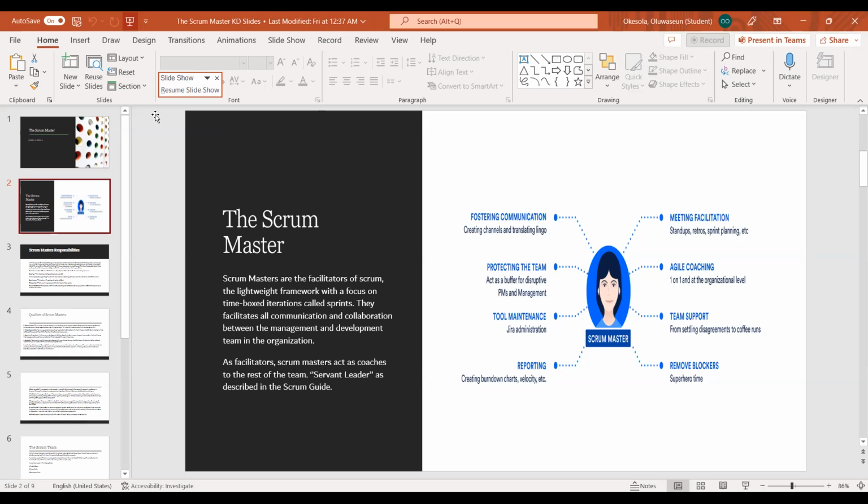Then the Scrum Master also facilitates the retrospective, and this is done after a sprint review where we want to talk about how the sprint went, what went well, what didn't go well, and what can we improve on? What are we taking from the last sprint? What lessons did we learn that we are taking into the next sprint? And what basically can we work on to ensure that it doesn't repeat itself? So a whole lot of facilitation goes into this because the Scrum Master wants to ensure that as they progress into a new sprint, the sprint keeps getting better, right?